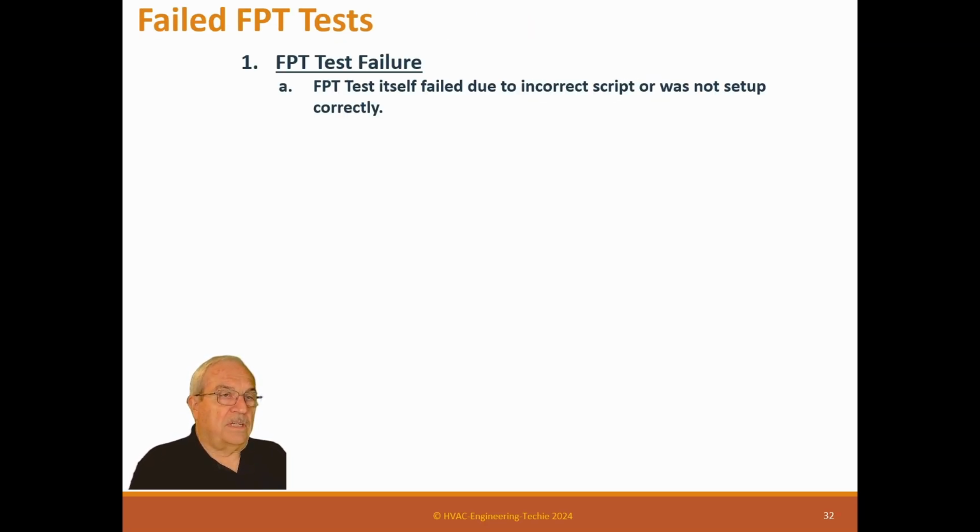Failed functional tests. The functional test itself failed due to an incorrect script or was not set up correctly. This is your problem, and that's not good, but then the test has to be run again to revise the script and do it again.